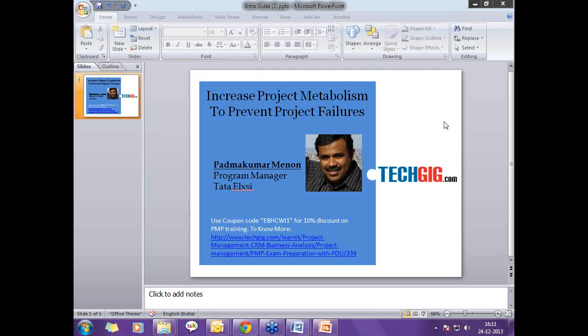You can't have an estimate which is 100% accurate. Now the question is, it's impossible to visualize all the scenarios and risks. But that is why a risk management workshop should not be a one-time affair. It should be done continuously. For example, if you have 5 phases, are you doing a key learnings exercise after each phase? Are you doing a risk workshop after each phase? Are you doing a requirement workshop after each phase, before the next phase?